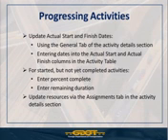Also, with the introduction of resource management, you'll also be updating individual resource assignments. So a resource may be assigned to work on an activity for 40 hours during the week, and you can actually update that individual resource assignment to say they actually worked 50 hours or they worked 20 hours on that individual task for that week. Does anybody have any questions? I know this is different from what you were doing before.